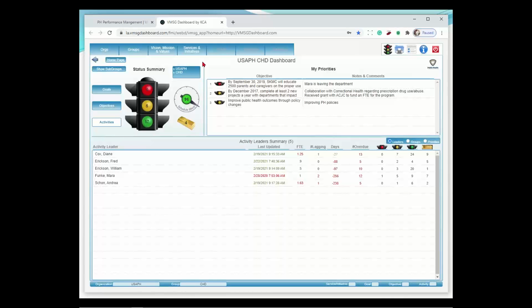First of all, this top left corner is where you typically want to start looking. That is what I call the big picture. That is the macro level view of, in this case, Community Health Division here. I can look at activities or objectives or goals, and that's why it's important to keep the traffic lights up to date, so that you can look at that and say, yeah, I'm 90% green or gold over here, and this gauge is showing me where I am relative to our schedule. Remember, we had a beginning date, ending date, and percent complete at the activity level here. We can go in and look at that and say, okay, I'm 96 days ahead of schedule. I'm doing a great job, actually, is what we're saying in there. The other thing you might notice is I get the little clicky finger when I roll over these things, meaning I can drill down to anything on the screen.